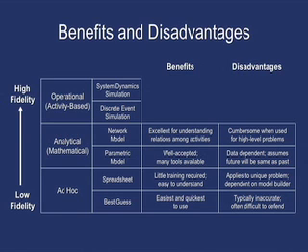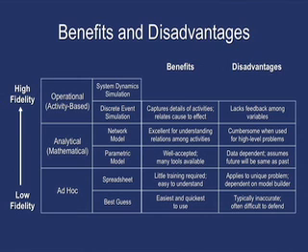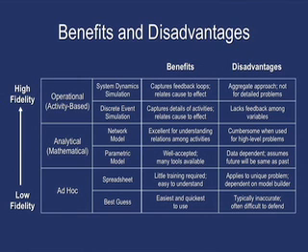For network models, they're great for understanding how all these activities connect and are related to each other, but the disadvantage is that they're often cumbersome when used for high-level problems. For discrete event simulation, it's great for capturing the details of these activities, and it relates cause to effect so you can see this flow of what happens. Unfortunately, discrete event simulation does not capture feedback among these variables very well. It's very, very difficult. It takes a super user to make some of this happen, and in some cases it may actually be impossible. Within system dynamics, benefits are that it captures the feedback loops that are missing in discrete event simulation, and similar to discrete event simulation, relates cause to effect. The disadvantages are that system dynamics is often used just at the aggregate level, and it's not very good for detailed problems.